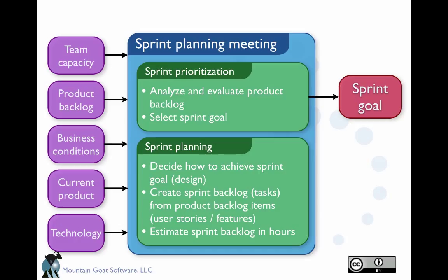And then you estimate how many hours each and every one of these tasks takes. And then you'll likely notice that again, not all of that fits into the sprint, so you have to prioritize there as well. But anyhow, that's your sprint backlog. So that's what you basically say: okay, this is what we're going to do. Our to-do list for this sprint.